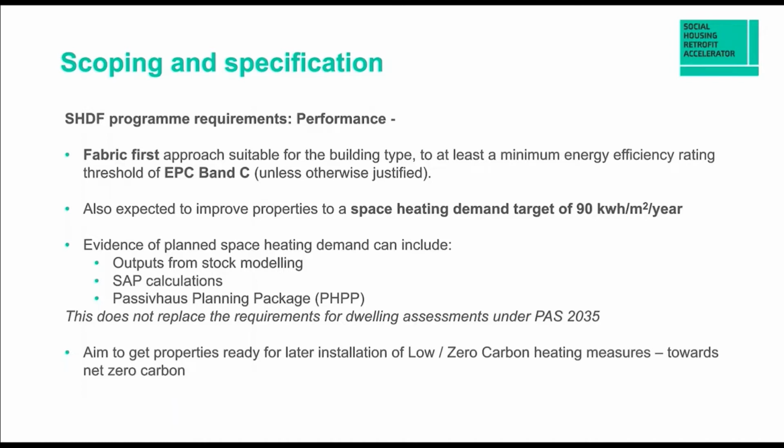Just on the last point there, aiming to get properties ready for later installation. This is very much part of the PAS process. PAS provides a quality methodology for staged whole house retrofit. It gives you a roadmap for whole house retrofit, and if you're funding this in different stages, the steps you need to go through, so as to avoid doing things which at a later date might need to be undone.